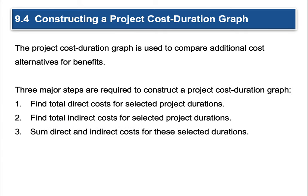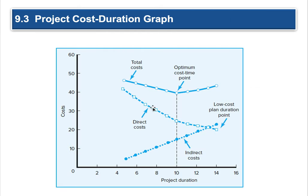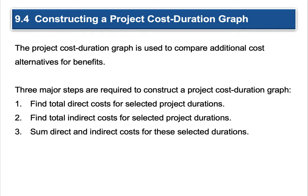Constructing a project cost-duration graph: the graph is used to compare additional cost alternatives for benefits. Three major steps are required. First, find the total direct costs for the selected project durations. These are your costs related directly to the project, and as you get more efficient they're likely going down over time as we see here.